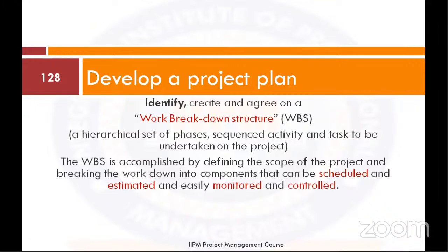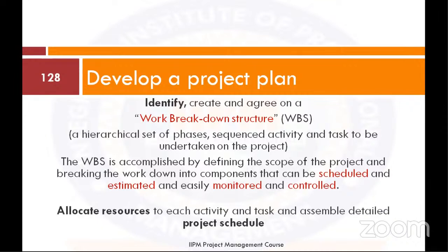So we've established that we need to do task collection software. The next question is, what are the steps involved? What are the tasks involved? What are the activities involved? We need to sit down and plan them. And that's what the project plan is talking about. Allocate resources to each activity and task and assemble a detailed project schedule.